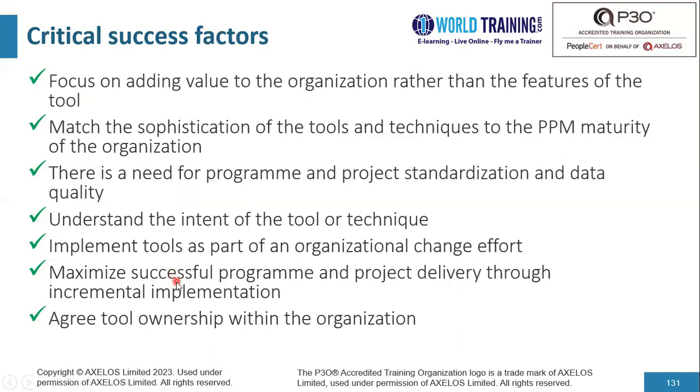The next one is to maximize successful program and project delivery through incremental implementation. Usually, a big bang approach is not a recommended approach when it comes to implementing tools. Always good to use an incremental approach. Let's say, for example, we would like to implement an enterprise-wide project portfolio management solution. We might want to kind of try it out in one of the business units where we have a lot of projects that are being managed, and then if it proves to be successful, we could kind of scale it to other business units within the organization.